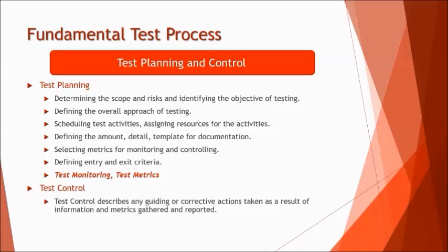Beyond that, obviously, defining and determining the different stages, when the other stages would begin, aligned with the other activities of the project. For example, when the documents are being prepared, the test manager must be involved to decide whether my team will be available at that point of time to conduct the reviews on the documentation or not.